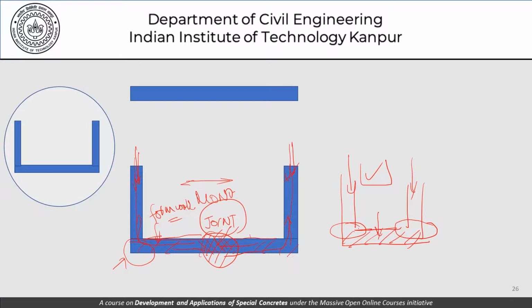So basically the decision making as far as the construction sequence is concerned has to be taken in view of the formwork, in view of the time that is involved, and also the joints that are involved in the construction process. So this is very, very important when we are trying to plan construction activities. It's very easy to say that we will precast this huge shape channel, but we need to draw up this procedure depending on the kind of geometry that we are dealing with.